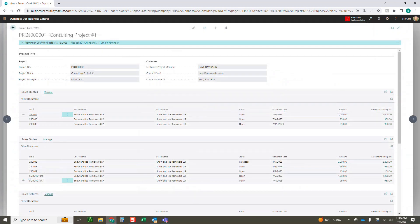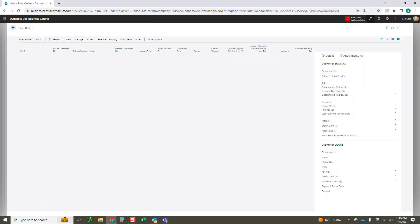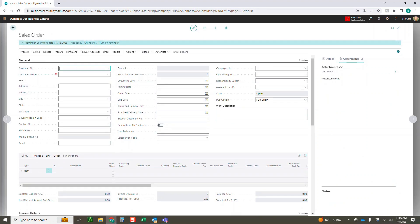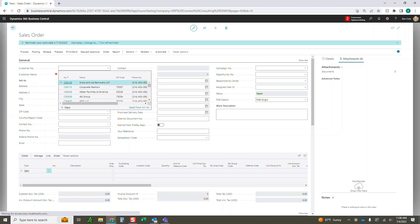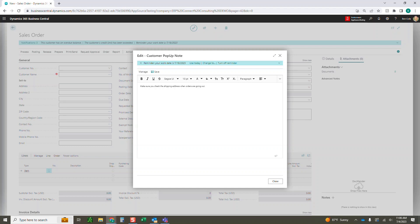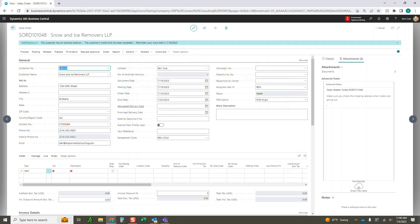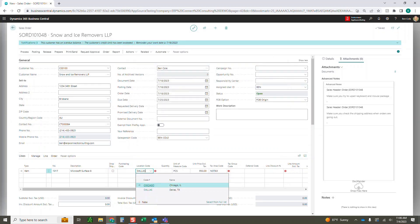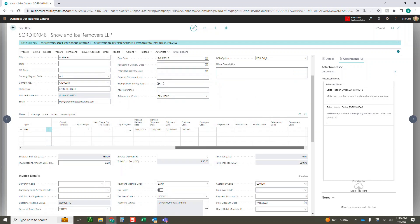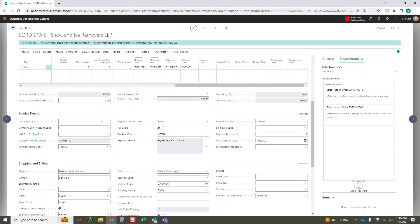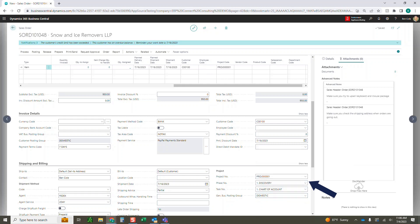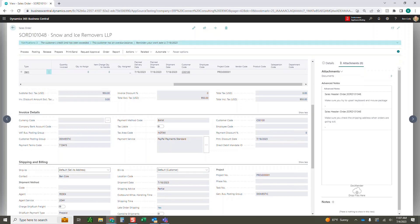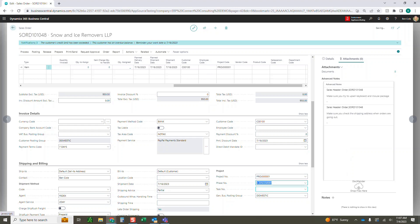We're going to jump back here and create a new sales document to show you how simple it is. This is for non-time-related items — just to add some miscellaneous sales orders and purchase orders into the system. I'm going to add a few items, do it in Dallas, and order one of them. You'll notice the project is not tagged by default — you'd have to come down and add it. I recommend doing it at the header level. When I default it into the lines, it shows up there. You can then add the phase and task for a more granular level, such as Discovery and Chart of Accounts.